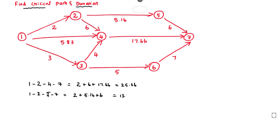The next path is 1→4→7. The duration is 5.83 plus 17.66, giving a total value of 23.5.